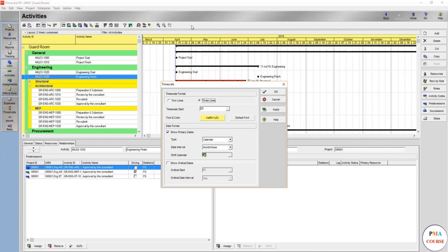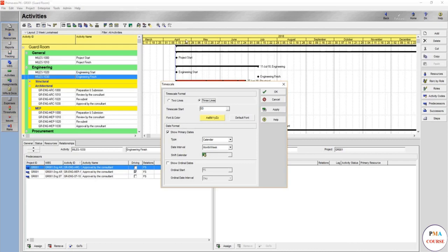You just want to show a number like one, two, three, four, five, six months rather than showing April, May, June, July. So in such case you would do show ordinal dates, make this by month for example, and here you go.